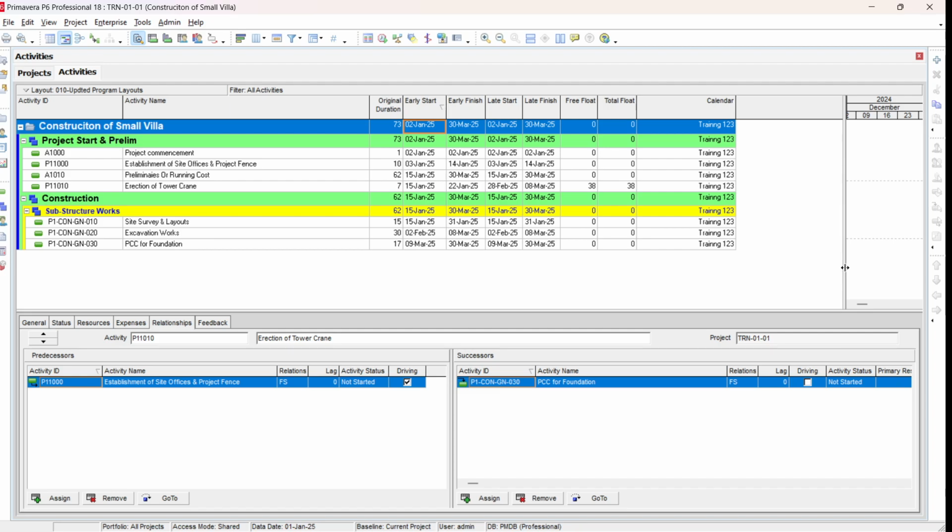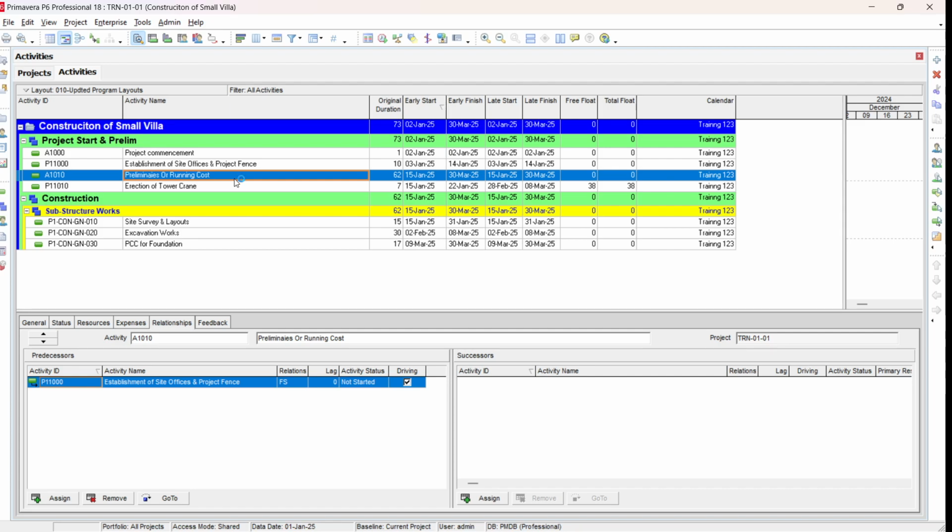how can we define and calculate the activity duration and assign these activities, and how can we create the activity calendars and then assign the calendars to the activities. For example, here one thing more I have to show, that the running or primary course is going on all over the project for the project duration. It does not consider any holidays or work reduced day. So running preliminaries are based on the overall project duration. So for this, we need to define another calendar.